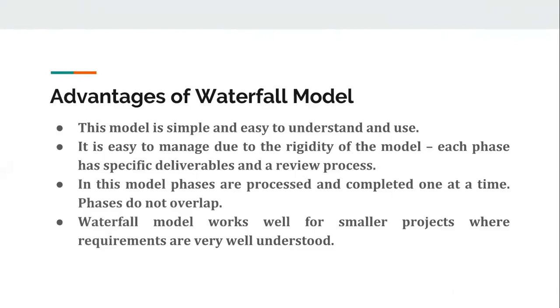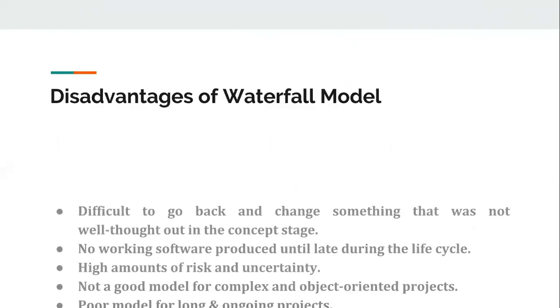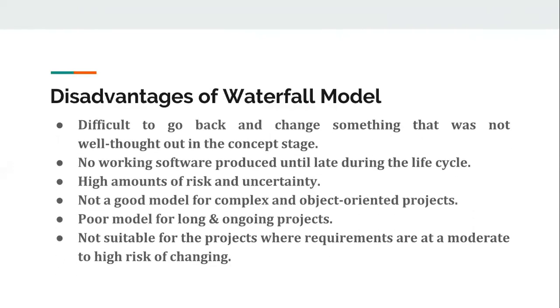There are also certain disadvantages to this waterfall model. When we are in the testing phase, it is very difficult to go back and change something that was not well thought out during the concept stage. There are high amounts of risk and uncertainty in this. Also, there is no prototype or working software produced until very late during the life cycle. This is not a good model for large or complex projects, or long or ongoing projects which are going to be for a longer duration. Also, this is not suitable for projects where requirements are at a moderate or high risk of changing.